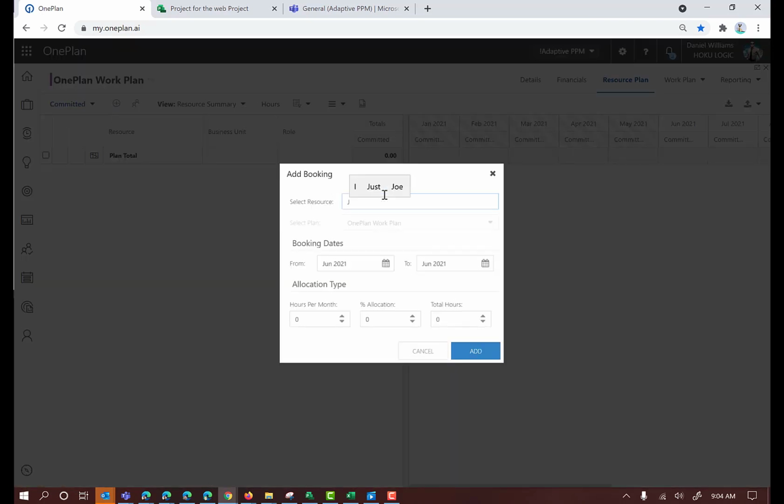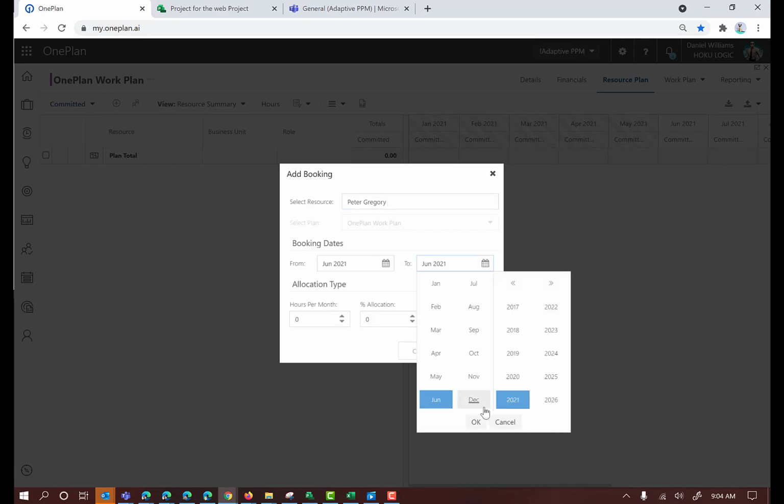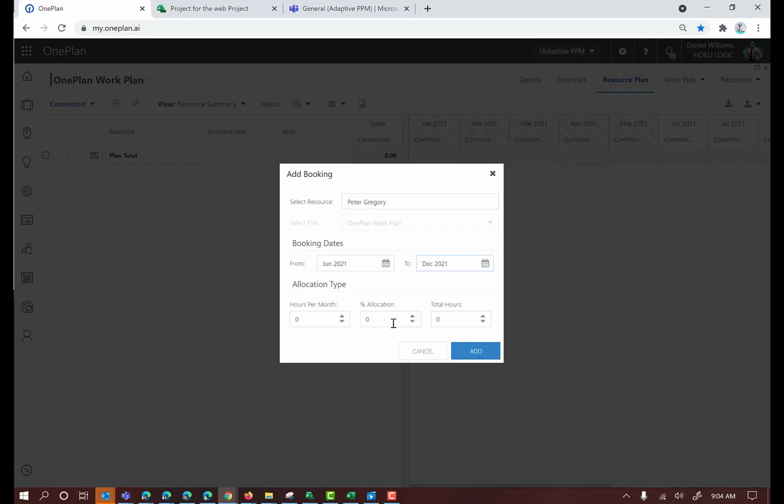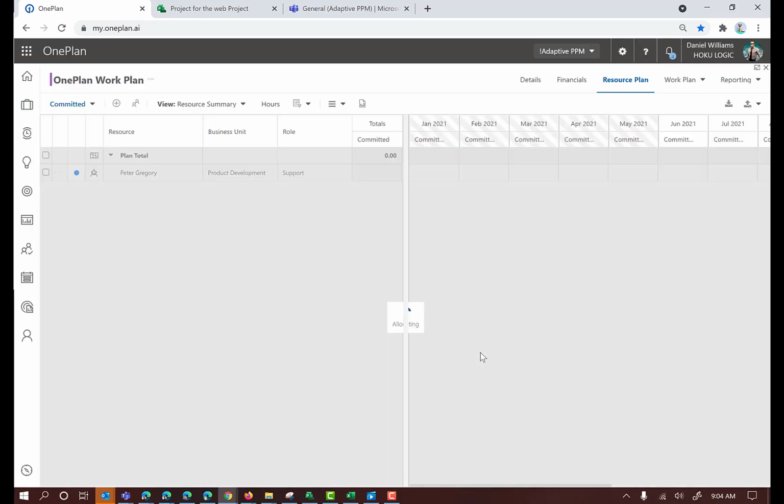If I wanted to say, let's go ahead and add Peter, I can just start typing a name and say add, and I can say I need Peter from June to, let's say, the end of the year. So we'll go ahead and say OK. And I'm going to need Peter at 50% allocation through that time. I can either enter in hours per month, or I can enter in the total hours all together, and it will prorate it across June through December. I'm going to go ahead and add that.